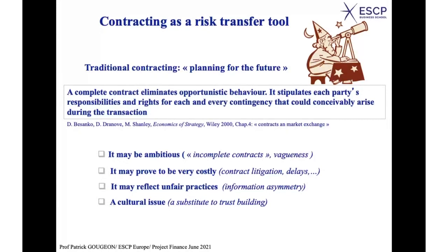What I am saying is that if there is no trust at all, it won't work for complex situations. And in project finance, you most of the time are dealing with complex situations. That is the main reason for the failure of projects: a lack of trust between the people who are developing the project, and typically, when you have PPPs, between bureaucrats in the government and the business community.